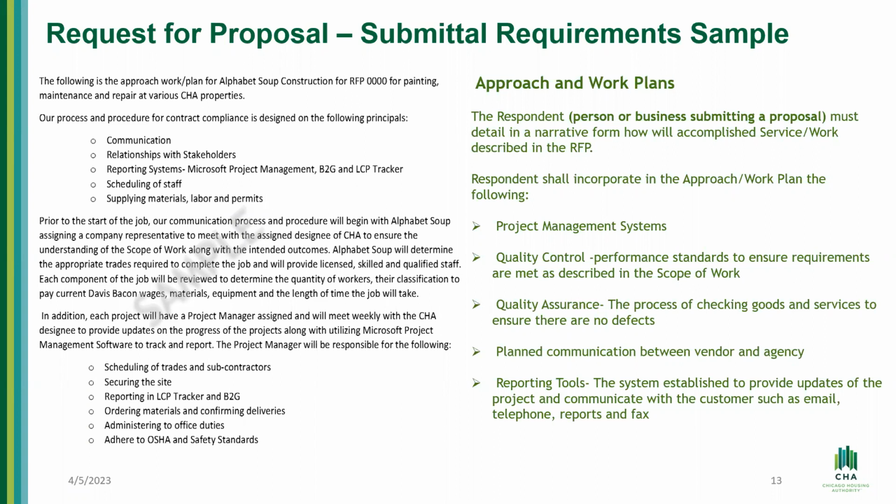You should incorporate in the approach and work plan the project management systems, and quality control, which is the performance standards to ensure requirements are met as described in the scope of work. Quality control is about the project. For example, it can be inspections, reviewing deliverables and testing the products.